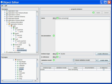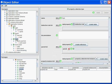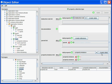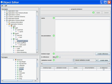Now, for a task, what I would like to know at any point in time is, of all the work events on my task, which one is the latest, which one represents the latest up-to-date information that shows me if the task is complete and how much time is remaining on it. I will then create a new instance to track this link, which I'll call latest work event.